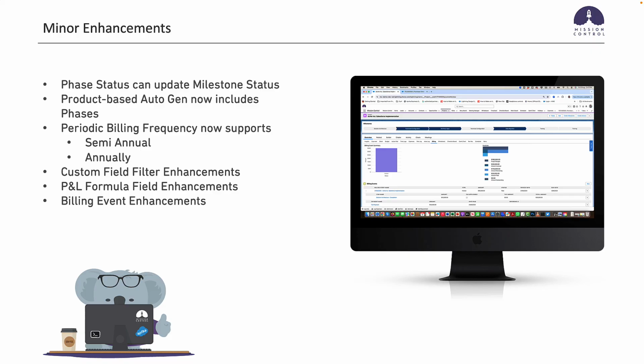With this enhancement, what you can now do is build a dynamic filter. So, for example, custom field filter 1 could be set to where action owner current user equals 1, and custom filter 2 would then be where contributor current user equals 1. So you can configure the rules to be and/or. In that instance, you would say I'm going to show all actions where the action owner current user is 1, or where contributor current user is 1. So that is a dynamic filter that can then be applied to everybody, so they don't all have to go off and create their own individual filters.